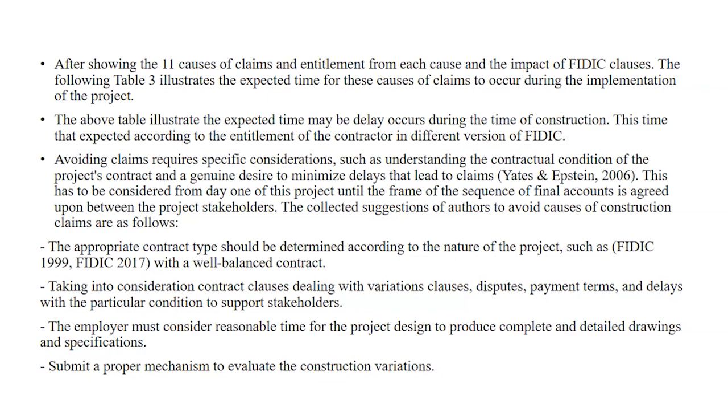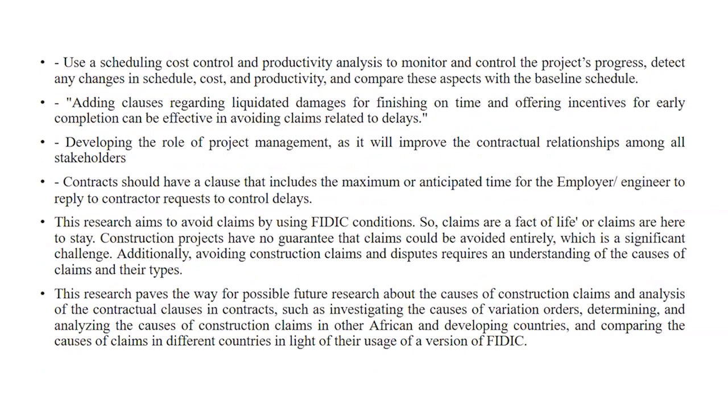The employer must allow reasonable time for the project design to produce complete and detailed drawings and specifications, and submit a proper mechanism to evaluate the construction variations. It is very important to develop the role of project management. It will improve the contractual relations among all stakeholders.